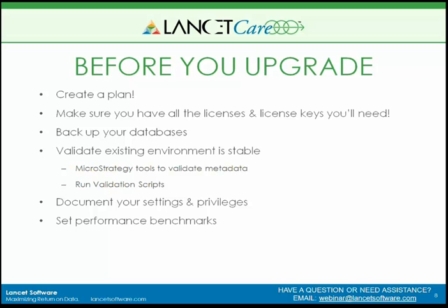Obviously, we want to back up our databases. Most important ones here are your metadata, as well as your narrowcast repositories. And then, as much as you're able to, validate the existing environment you're starting with. Some of our biggest problems with upgrades are that after an upgrade we have a problem, we're troubleshooting it, trying to figure out why this problem happened because of the upgrade, and eventually you go back and test it in the old environment and find out we just found a problem that's always existed, but we're only now catching it, and it gets mixed in with the upgrade and can really delay your upgrade.